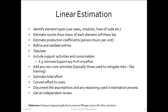Here's how to do the linear method of estimation. First, identify the element types you wish to count — use cases, modules, or lines of code. Then estimate the counts: how many use cases, modules, or lines of code will there be? Estimate production coefficients — the person hours the team will expend to create one unit of the element being counted. Through discussion, refine and validate these entries. Tabulate them in a spreadsheet. Don't forget to include support activities — for example, estimate support as a percentage of overall development effort. Add non-core activities such as risk mitigation activities like training.